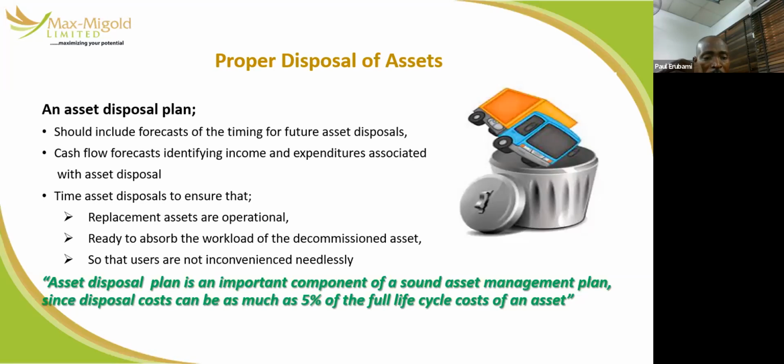Time the asset disposal to ensure that the replacement assets are operational. That is the one you use to replace the old one, ready to absorb the workload of the decommissioned asset. So when you decommission an asset, you must be ready to accept the task being performed by that asset, so that users are not inconvenienced needlessly. An asset disposal plan is an important component of a sound asset management plan.